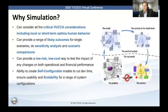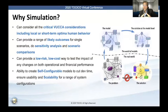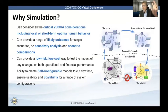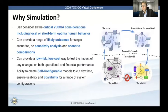The last component of why simulation — a major breakthrough we made a couple of years ago. In the past, you could build simulation models, but it would take a long time — a simple model around three months, and big models could easily take 12 to sometimes 24 months. What we started testing was: why can't we build self-configurable models completely from data? In this demo, we asked the people to give us a complete export of their full project management portfolio — a full work breakdown structure showing all the programs, the projects that make up each program, the phases that make up each project, and even down to task list or checklist level. We can read that in, add variability, and as we're reading it into our platform, it builds a complete and accurate digital twin of that reality.